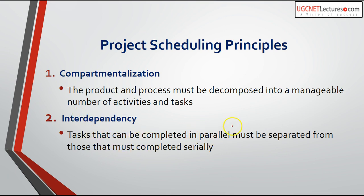The second phase is interdependency — tasks that can be completed in parallel must be separated from those that must be completed serially. If you do not separate parallel tasks from serial tasks, you will end up doing parallel tasks serially, which takes more time. For example, if six tasks can be done in parallel they will take one day; if you don't identify this, you'll do them serially and it will take much more time.